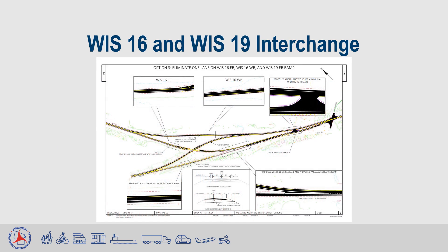This slide shows an exhibit of option three. As you can see in the typical section on the bottom middle of the exhibit, the existing sections highlighted had two 12-foot lanes with 10-foot shoulders. The finished section shows our selected typical section with one 12-foot lane, five-foot paved shoulders, and five-foot gravel shoulders. The detailed views of the segments shown illustrate how the permanent configuration will look after the project.